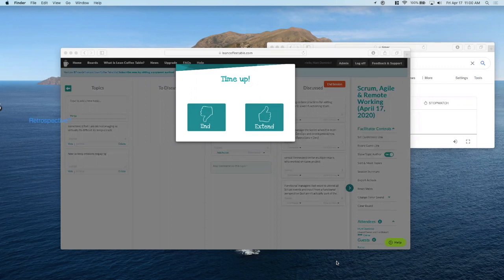I think to your point, Karen, your challenge is that the team thinks that they're working in 2-week sprints, but they're not following what your definition of done is. And so maybe an idea is that with your retrospective, you revisit the definition of done. So for every item that you think is ready to go, you address it and go, okay, does this meet our definition of done?